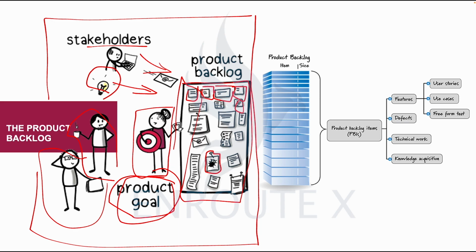Every requirement is meant to be sent to the product owner so that all the requirements could be captured on the board. The impact of that, where requirements do not go through the product owner, is that you end up having team members, developers, working on multiple tasks that is not captured, that is not visible. So it could bring some burden to the developers, but work will not be transparent enough.